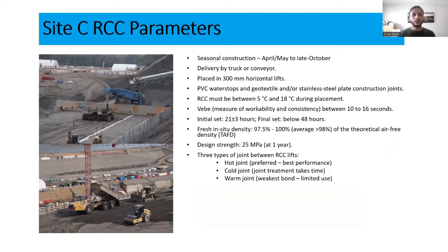So for the design of RCC, what considerations did we take into account? Because RCC is not regular concrete, it's not going to be vibrated with vibrators, or finished with a trowel or a hand tool or a mechanical tool. So there are a few things involved in this. One is season, because we cannot construct RCC when there's rain. Similar to any concrete, we cannot place concrete when there is rain, because water gets into the concrete and the whole water-cement ratio is not balanced anymore.